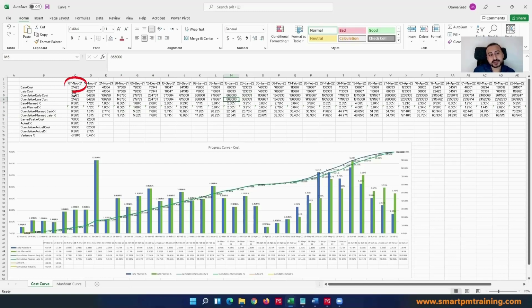You have the planned cost, but planned value based on work done, as the way you submit, you claim in the BOQ. But in real life, you have advanced payment. There is a retention for advanced payment recovery. There is also retention to guarantee the quality of the project and the defects liability period, DLP, and how much this 5% retention will be released. And if you put everything together, you want to make sure that you are not going negative.